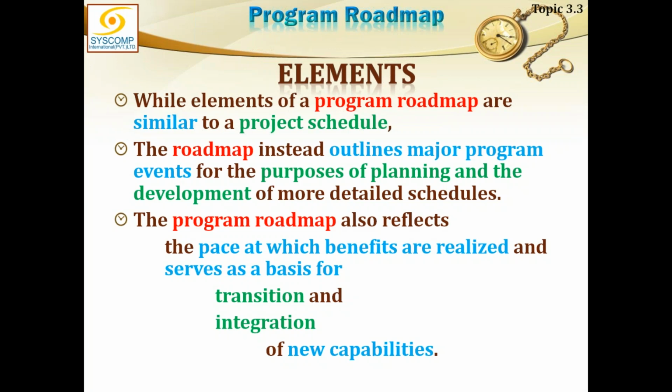While elements of the program roadmap are similar to a project schedule, as I said before, the roadmap instead outlines major program events for the purposes of planning and documentation, meaning he will share his findings with many others, and those are the people who are actually deciding the fate of it. Program roadmap also reflects the pace at which benefits are realized and serves as a basis for transition and integration of new capability.